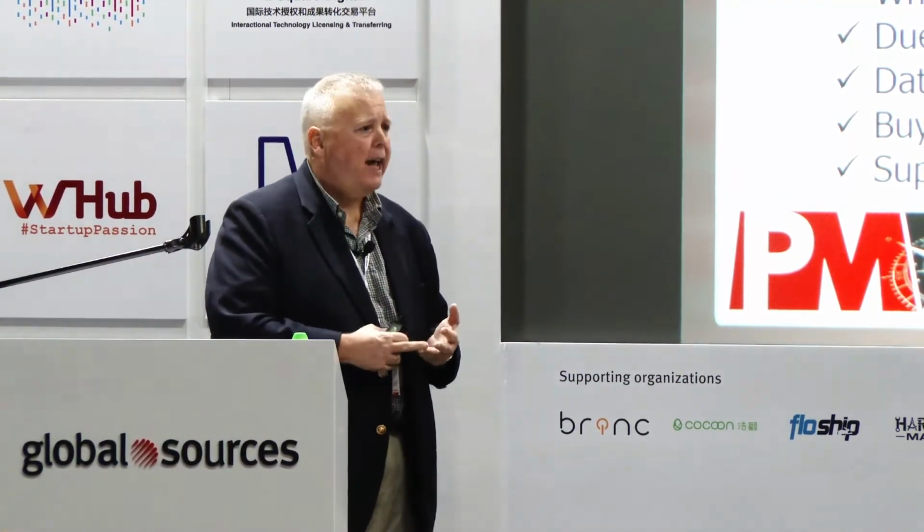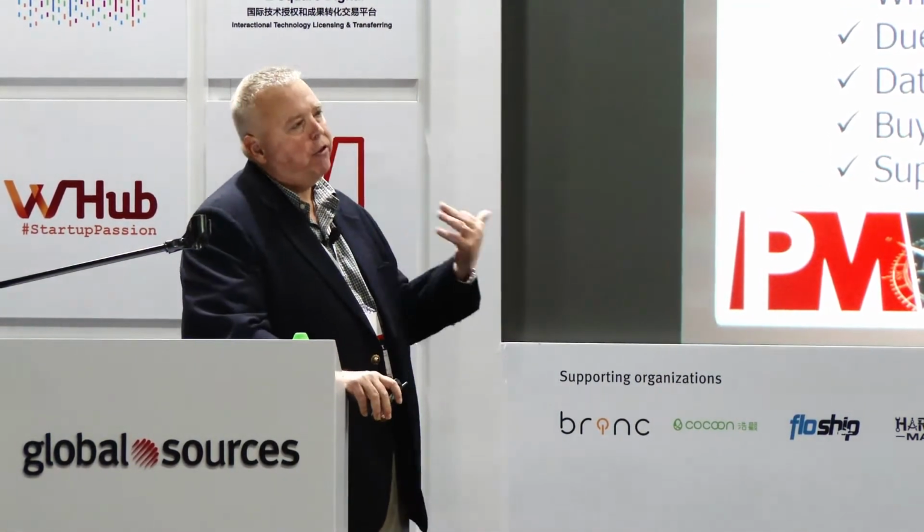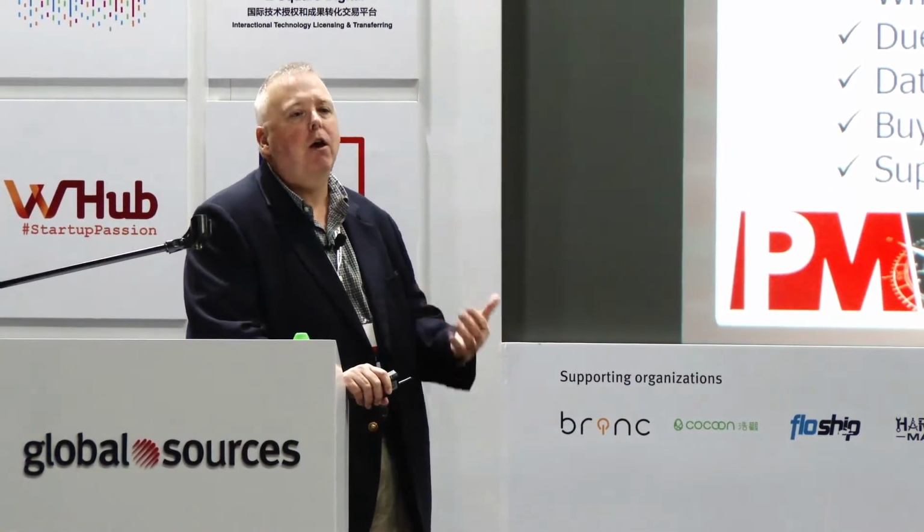When is it going to be completed? What's the update? And if there is a problem, what is the problem? What's the root cause of that problem? How are we going to solve it? And how are we going to get back on schedule? Be very diligent. Don't say, well, this Wednesday, everything's going fine. We talked last week and nothing's going to happen for the next 2 weeks. Don't get into that rut where you don't call them up. Even if there's no update, call just so that they know everyone is still on the same page.